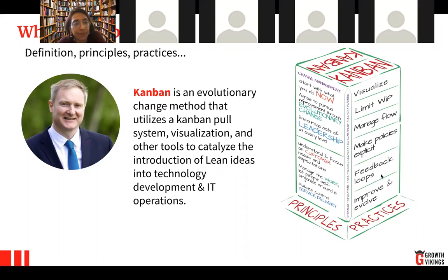Feedback loops, very important, is another practice within the Kanban community. So we're going to have spaces for the teams to have their daily meeting, because they're not called daily Scrums, okay? There's just a daily meeting. And in that daily meeting, they might overview how the work is flowing and explore together if there's any bottleneck or not. They have this opportunity.